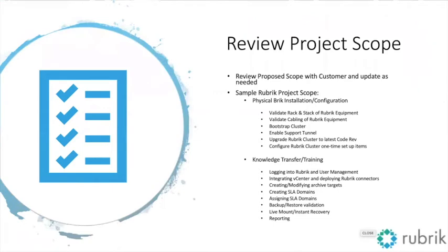Before wrapping up the pre-installation planning call, you'll want to review the project scope with the customer to ensure everyone is on the same page. There is a sample project scope listed here, which typically includes the physical brick installation and configuration, as well as a knowledge transfer training session. This scope can be updated as needed.